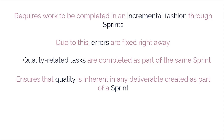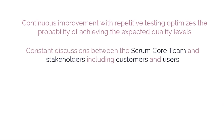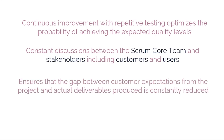This ensures quality is inherent in any deliverable created as part of a sprint. Such potentially shippable deliverables from Scrum projects are also referred to as 'done.' For example, if internal customers are not happy with a product's quality, the issues can be listed in the prioritized product backlog and addressed during sprints. Thus, continuous improvement with repetitive testing optimizes the probability of achieving expected quality levels. Constant discussions between the Scrum core team and stakeholders, with actual increments delivered at the end of every sprint, ensure the gap between customer expectations and actual deliverables is constantly reduced.